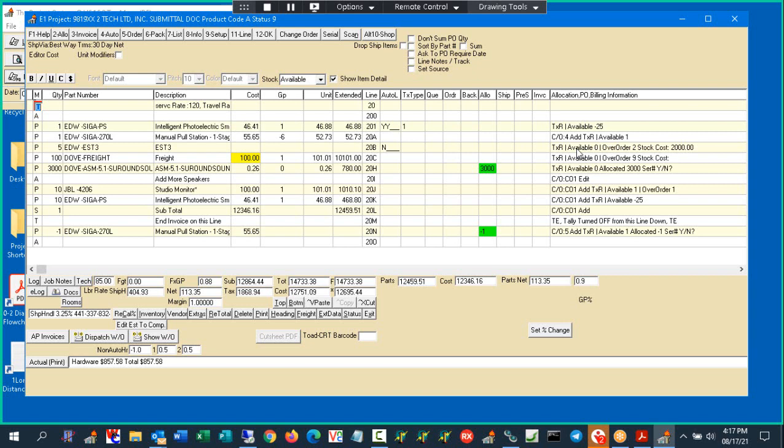What is the question? Craig had a question. Go ahead. It goes back to when we job cost, the picked items are not invoiced. We don't get an invoice from Edward, so it doesn't get put in the accounting system. Correct, because we did that by hand. So that goes into magic poof. Because we created a picking list, we know it's allocated. We grab those parts, but from then on, that cost is not put against that job.